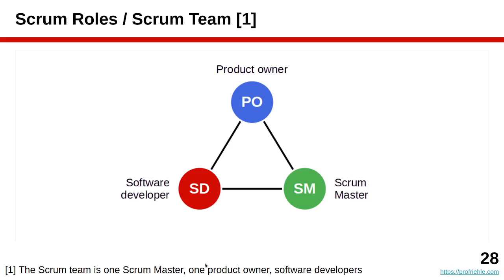Scrum relies on three main roles: the Scrum Master, the Product Owner, and the Software Developer. These are roles, so multiple people can play them. One person can play multiple roles, though it's not always advisable for a software developer to also be a Scrum Master or Product Owner. In AMOS we have one Scrum Master, two Product Owners, and six software developers in the default team — nine people total, which is a comparatively large team. Most Scrum teams are smaller.